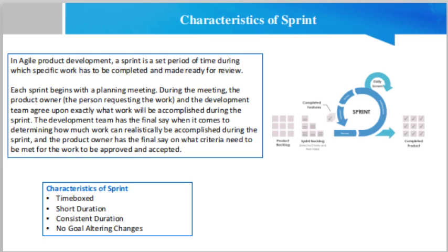Demonstrates progress. In traditional project management, the progress was measured but couldn't be demonstrated often. A development phase would run for 3 to 4 months and actual progress would only show at the end of the development phase. However, Scrum allows showing the work finished at each sprint. The Scrum team needs to demo the work done to the product owner, and he needs to accept the deliverable before the sprint closes successfully. It also helps in getting quicker feedback and early detection of any issues.